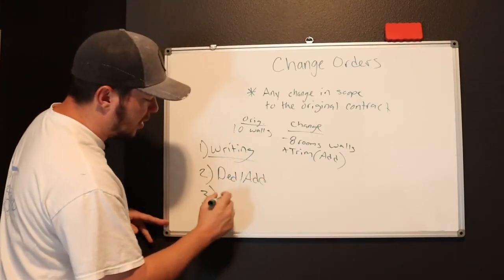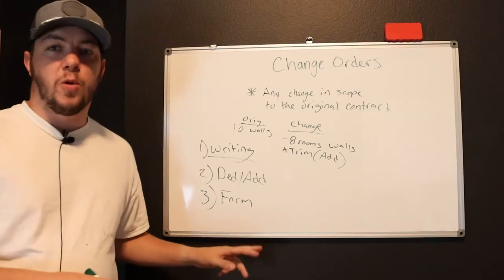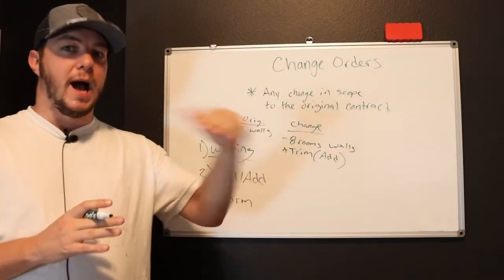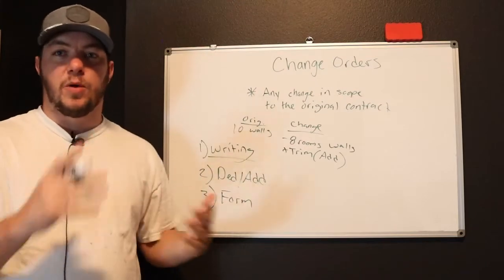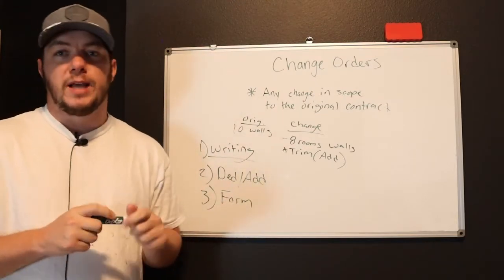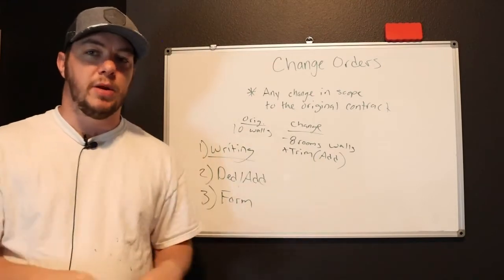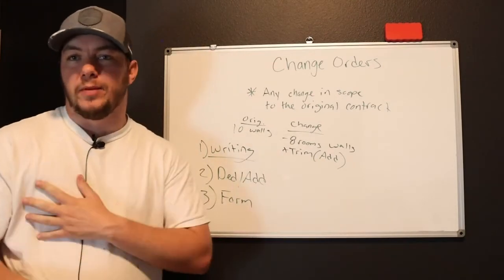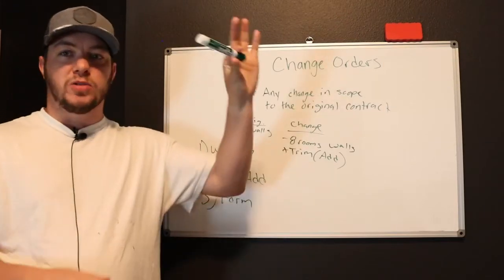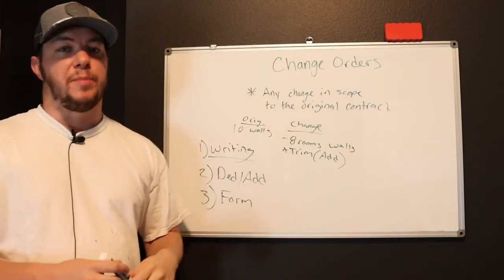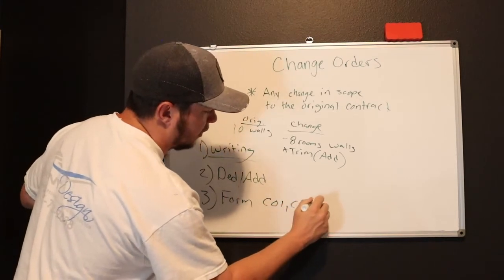And then the next thing you're going to do is you're going to put it on a form, a change order form. Usually this form is going to be—the way I do it—the same form that I use for proposals. So if I send a proposal off for a bid, I take that same form at the top where it says proposal to, and then work to be completed and all that stuff. You can get a copy of that by going to my website, theeasiestbusiness.com/free-downloadable-proposal-template. I just take my proposal form, take away the words proposal and then I put change order one. Change order one, CO1, CO2, etc.